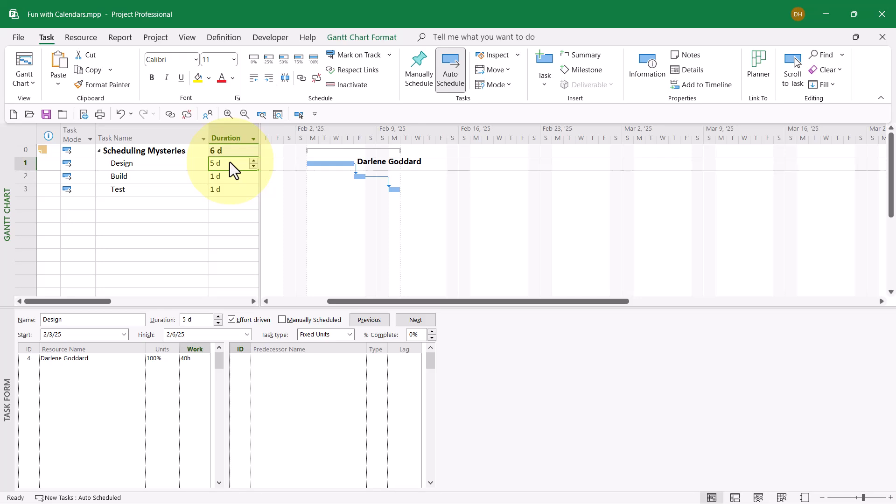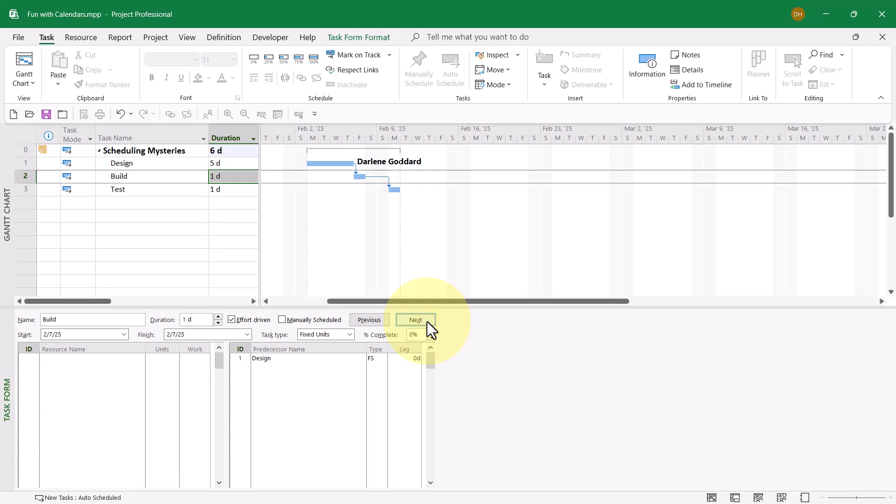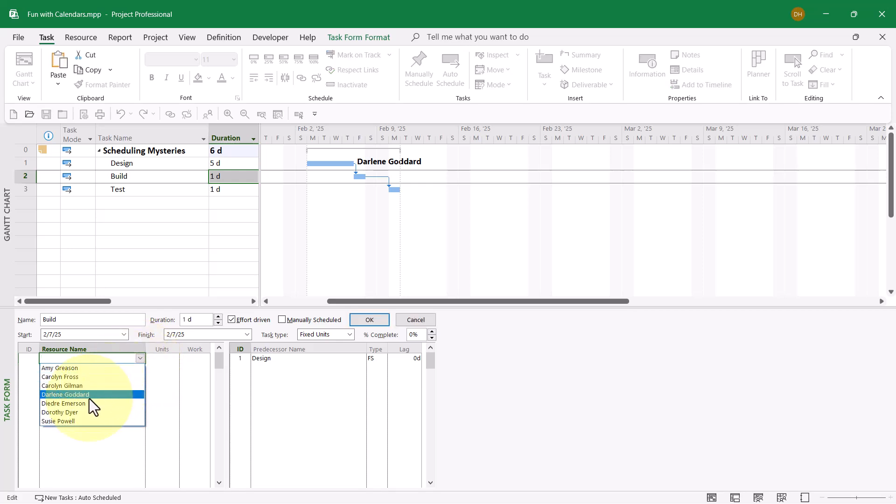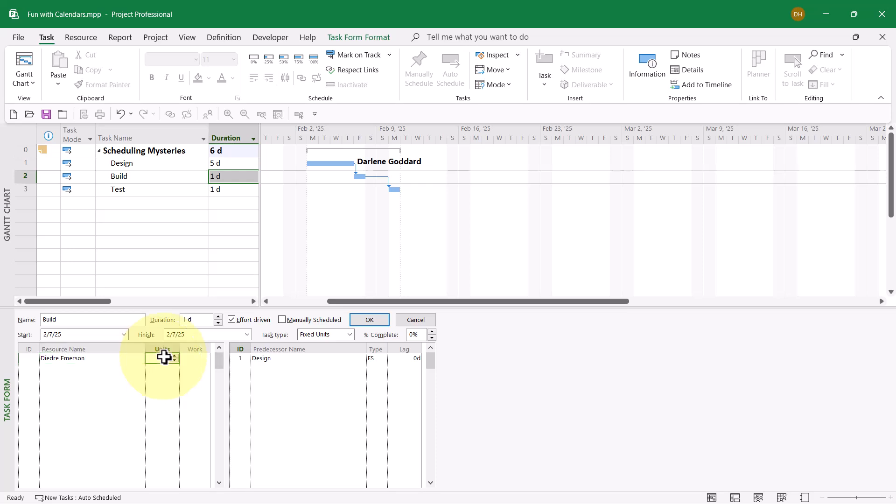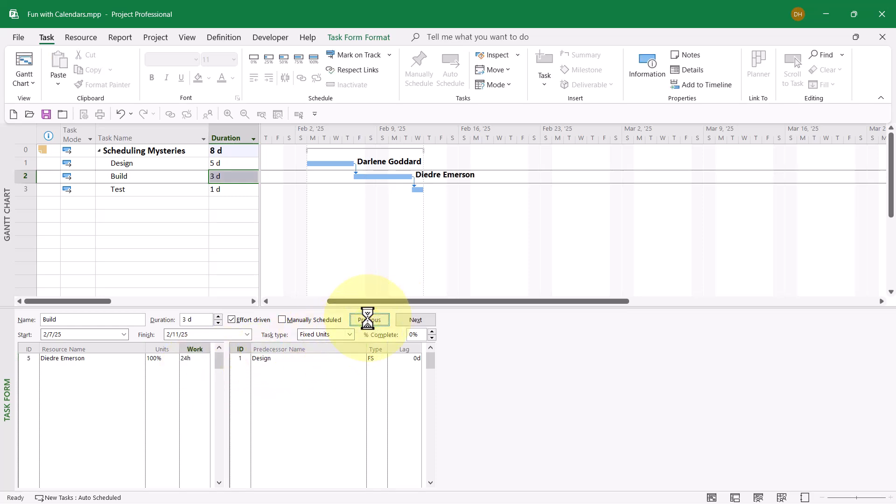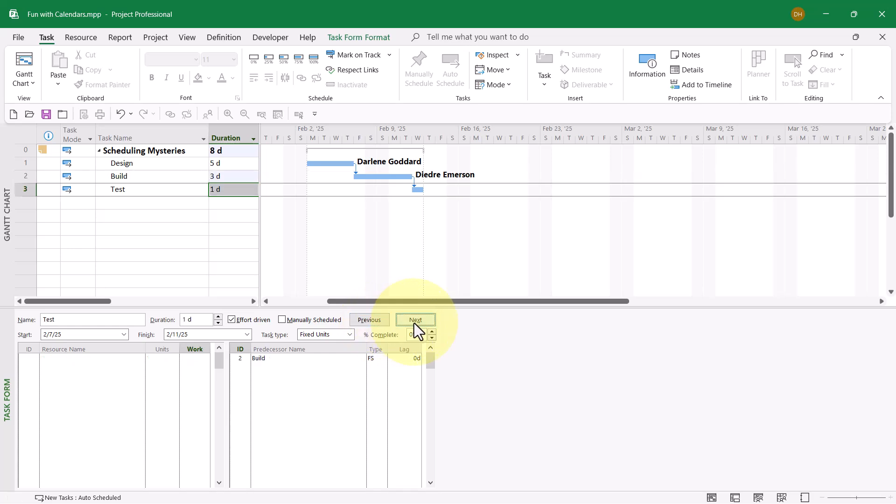I think we're going to leave Darlene Goddard assigned to the task design. Let's move on. I'll click the button called Next, and on the task build, let's assign Deidre Emerson to work on this task full-time for 24 hours. When I click the OK button, Microsoft Project calculates a duration of three days, and the schedule is just fine. A miracle.